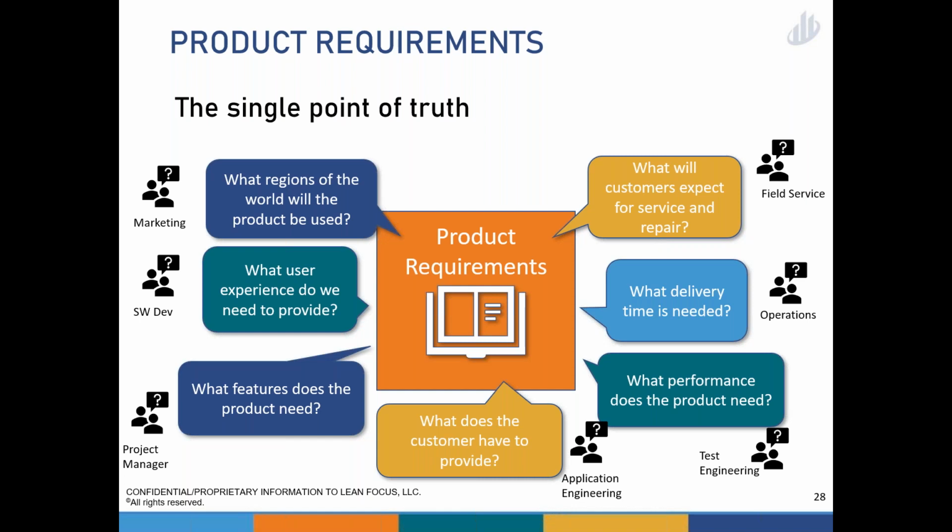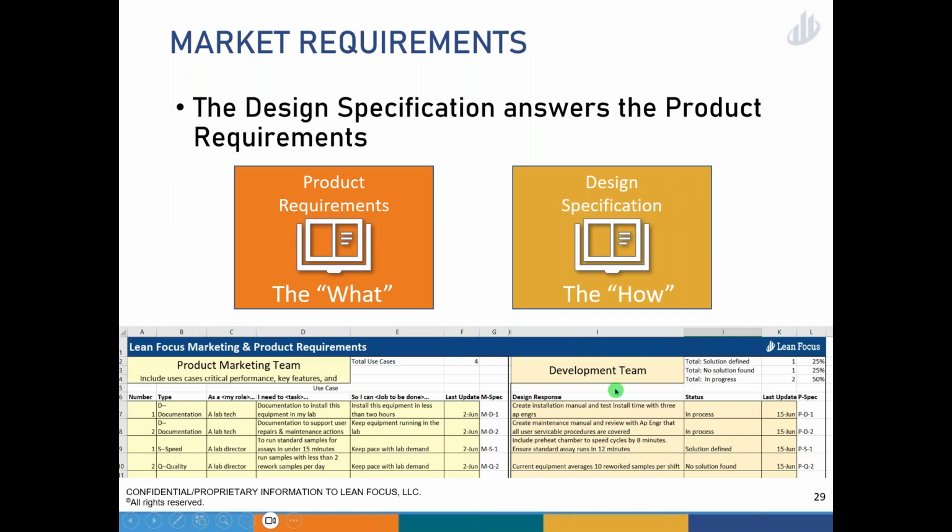And so, what do customers expect? What we want to capture in product requirements before we start a project is all the requirements that our customers expect. And this can be a long document, right? This can be 20 or 30 pages long. This is what customers want to see happen. This really defines the product. And we understand what it is we have to do, and it allows us to plan carefully.